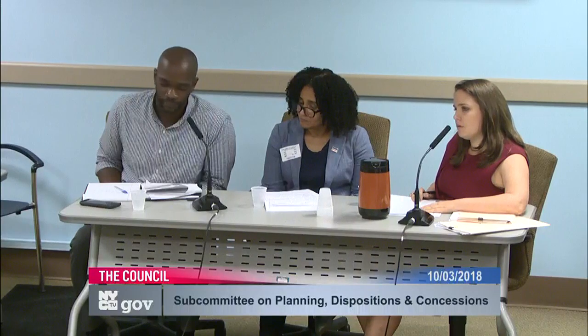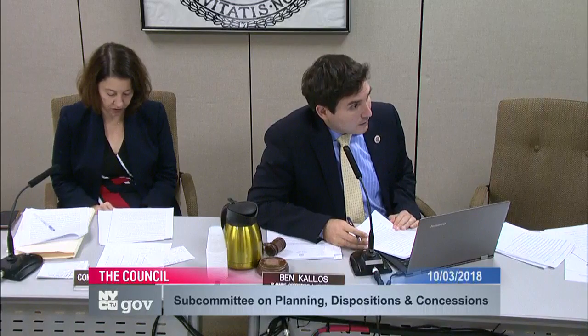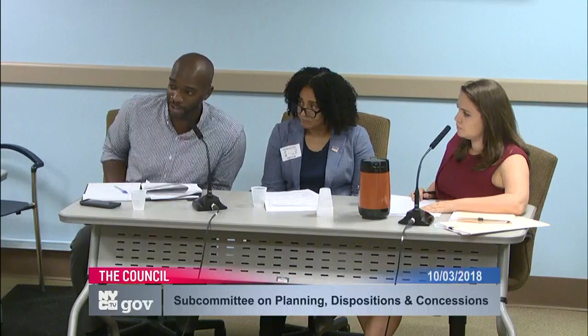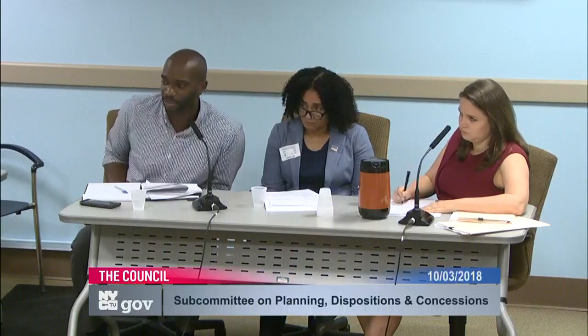When will the construction begin and when will it complete? So right now we're aiming for a December financing commitment to begin construction. With that expectation, we'll expect construction to begin sometime in January. And we normally aim for an 18-month construction period. So with that said, June of 2020 would be the aim for completion.